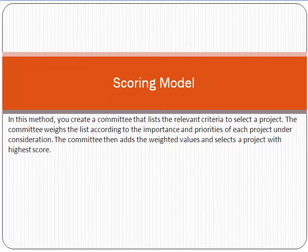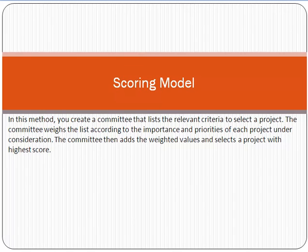Another approach is the scoring model. In this benefit measurement method, we give a score to every project based on cost, benefits, and other factors. For example, if there are three projects — Project A scores 5, Project B scores 6, and Project C scores 7 — we select the project with the highest score because it performs best across cost, benefits, and other relevant factors.